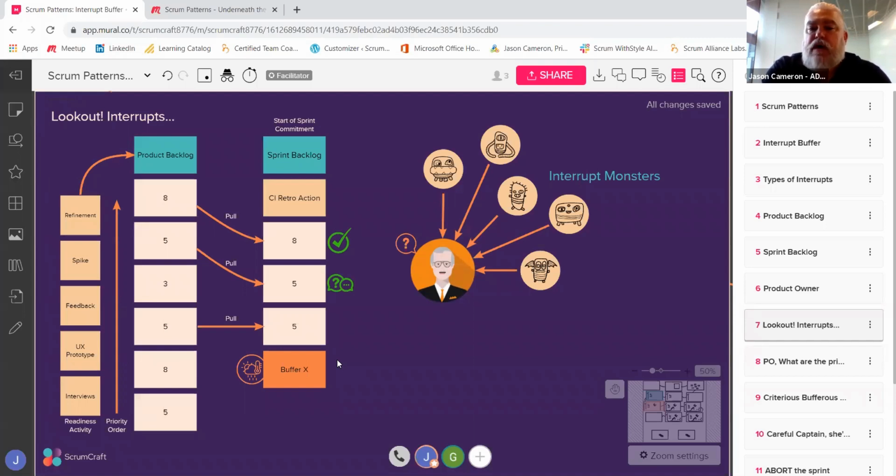You can, as a newer team or a team that's coming to maturity, the buffer might be a little larger because of the element of the unknowns or the complexity or the maturity in one respect. So the buffer might be determined based on, in the last sprints, we've seen an extra 5 points come in consistently from interruptions. So we might give it 5.